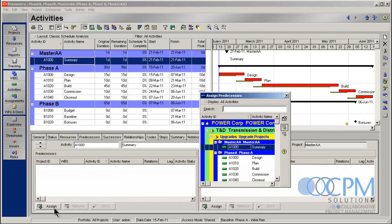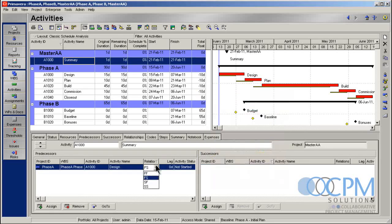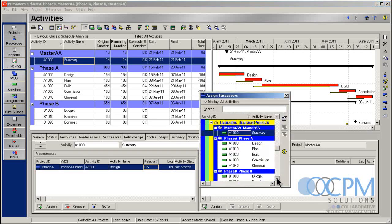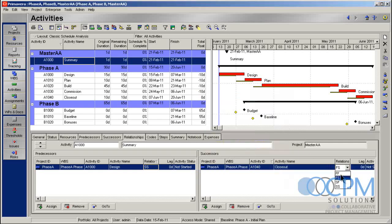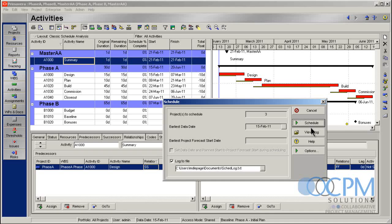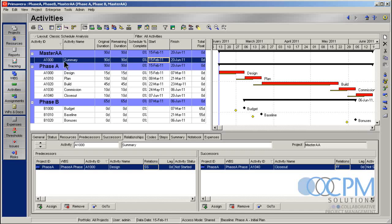Go in here, assign a predecessor of design. Make it a start to start. Assign in the successor of close out. Make it a finish to finish. Okay. Let's go ahead and schedule. Keep your eyes on the original duration and these dates up here as I schedule. That's a little bit better. That's the result I'm looking for. Okay. So I've got the 15th to June 20th and 90 days. And now my master project summarizes the both projects together. And I've got the desired result that I'm looking for here.